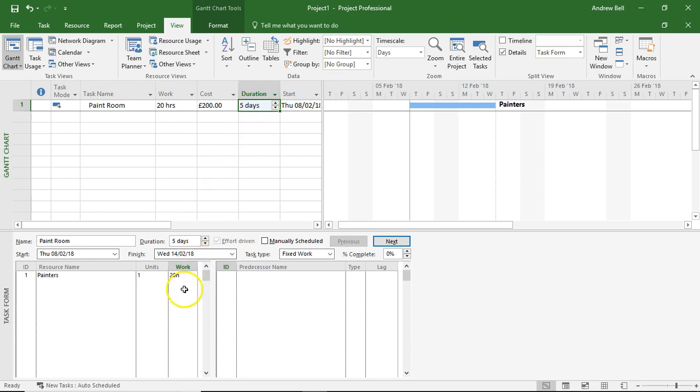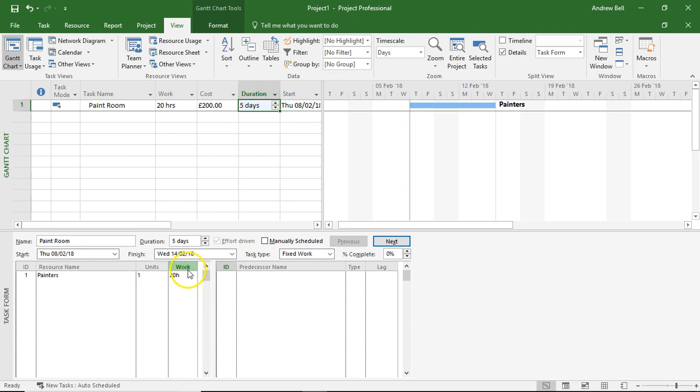Now the relationship between work and the number of units doing the tasks and the duration is clearly linked. There's three variables here: the amount of work, the number of people, and the duration. What we need to do is make sure that we fix the correct one according to the task type.